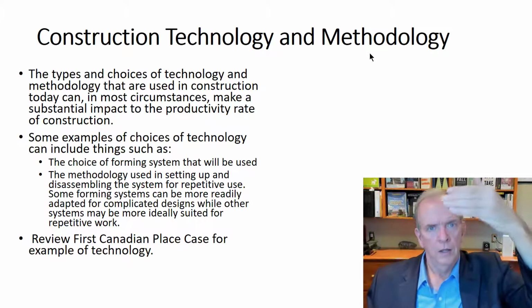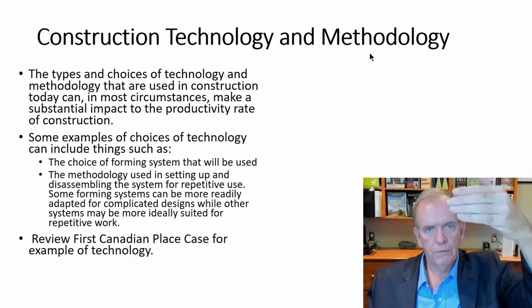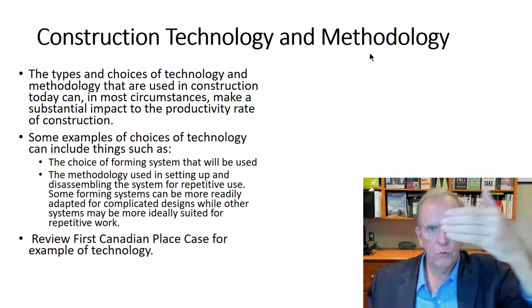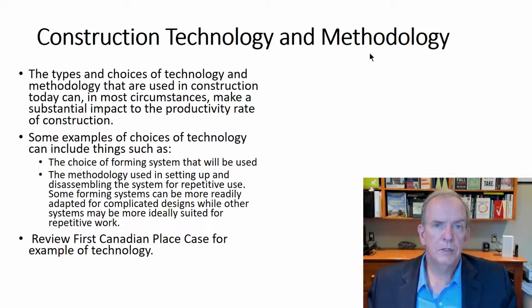So instead of taking one floor off, putting one floor back, you have one crew always taking off and one crew always putting on. What do you think that does to your schedule? Cuts it in half. Cut the schedule in half. You get the project, right? So that's another fun thing about construction, is trying to figure out better ways of doing things. And there's always a better way of doing these things. So methodology can really, really dramatically change how we do things.